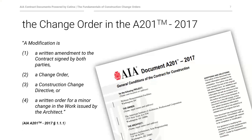How does the AIA A201 general conditions of the contract for construction address modifications to the contract? The term 'change order' is found 23 times in the 2017 version of the AIA A201. In its first paragraph, under the definition of the contract documents, the A201 outlines four means by which the contract may be modified: one, a written amendment to the contract; two, a change order; three, a construction change directive; and four, a written order for a minor change in the work, typically in the form of an architect's supplemental instructions, or ASI.